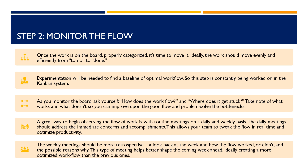A great way to begin observing the flow of work is with routine meetings on a daily and weekly basis. The daily meetings should address the immediate concerns and accomplishments, allowing your team to tweak the flow in real-time and optimize productivity. The weekly meetings should be more retrospective — a look back at the week and how the flow worked or didn't, and the possible reasons why. This helps better shape the coming week ahead, ideally creating a more optimized workflow than the previous ones.